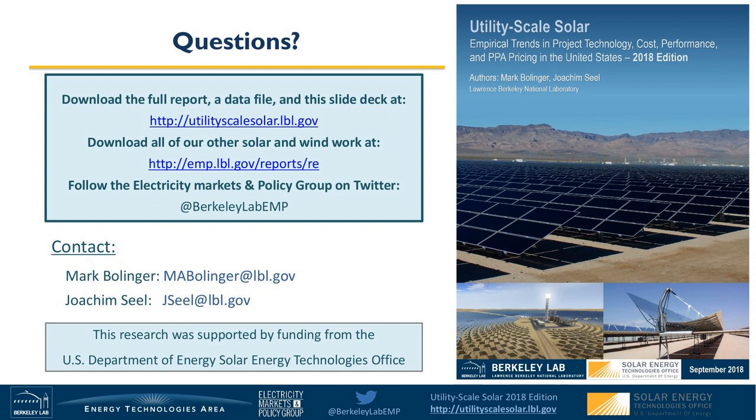Now, the IRS has also issued so-called safe harbor guidance that if you have made what they call a substantial investment of about 5% or so in any year, you can lock in the ITC at that particular year and have until the year 2023 to actually complete the project.